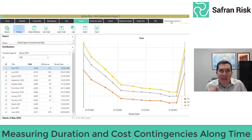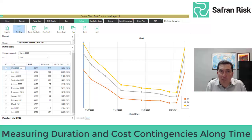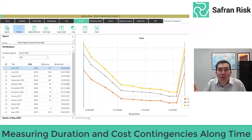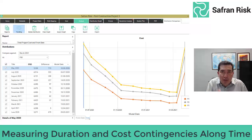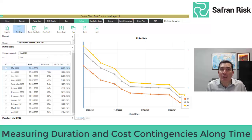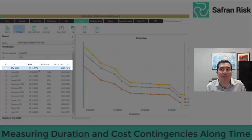For example, in this project starting on May 2020, we recorded both total project duration and total project cost as it was perceived on that date. Given all the uncertainties and risks perceived at that moment, project delivery date evaluated at its 80th percentile was calculated in September 2031.